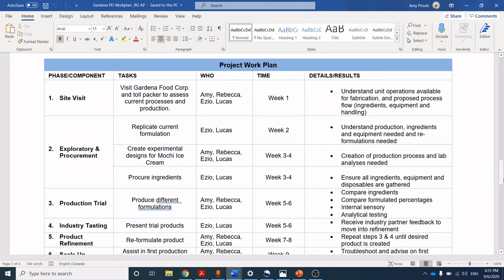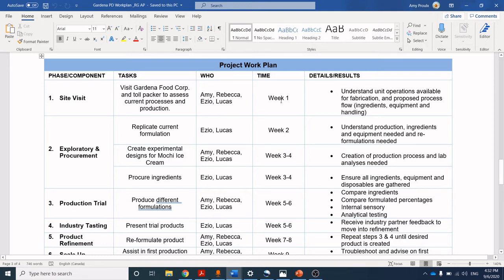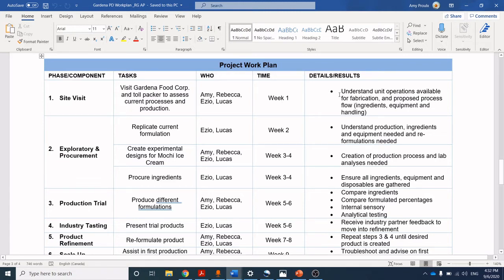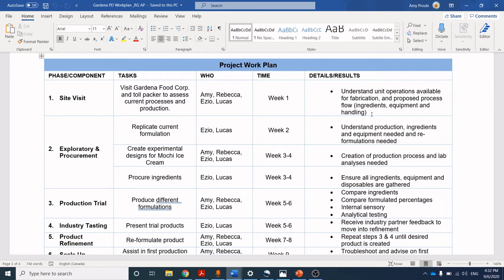You need to go through systematically and think step by step what you need to do to accomplish the different outcomes. First, we decided to do a site visit to Gardena Foods to find out what the current processes looked like, how the equipment functioned, and learn about the specifications on the equipment. In high-level point form, we outlined what that task was, who was going to participate, and gave a rough estimate on how long it would take — we thought one day. The last piece was putting in detailed outcomes: what we expected to accomplish at a high level, specifically to understand unit operations available for fabrication and identify a proposed process flow for ingredients, equipment, and handling.